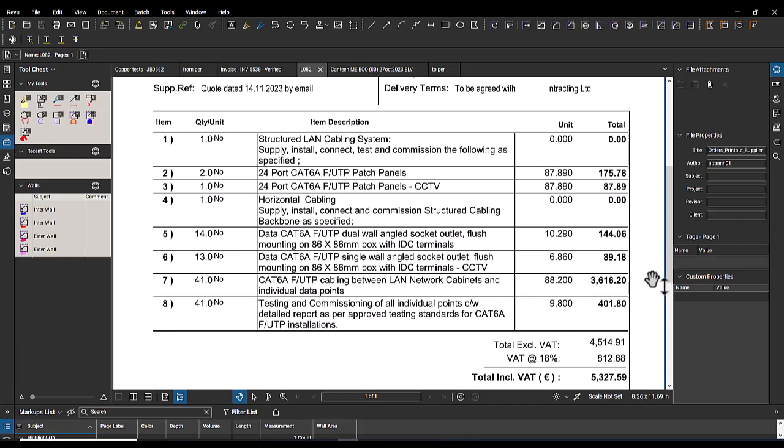The reason we don't code it as per linear meter is to avoid measuring on the site, and to avoid the subcontractor putting in more length of it. So that's why we code this as per points. And I don't understand here.